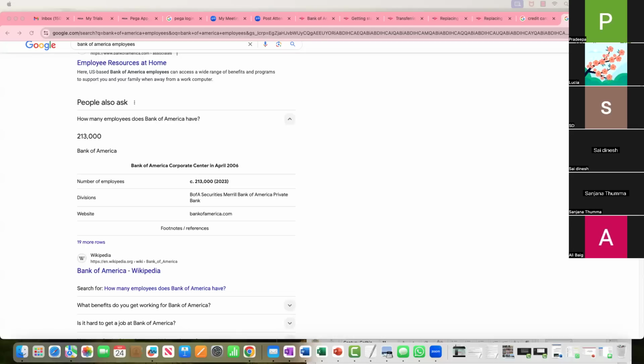You got it? We don't go more than 30. In my experience, we don't do it more than 30. If it goes more than 50, we'll definitely divide into multiple Scrum teams, because it's very hard for us. In the status call, it's going to be very chaotic, and we don't know who is on PTO. We cannot track anybody's work. In the planning call, it's going to get very chaotic, right? So we want to make sure it's less than 30, or at least 30 should be fine, but not more than that.